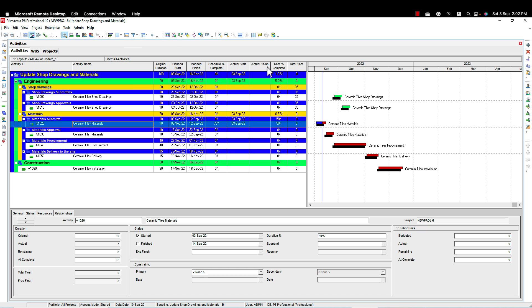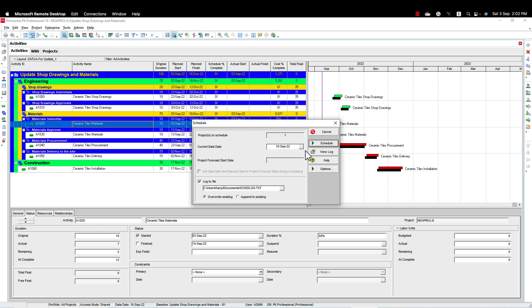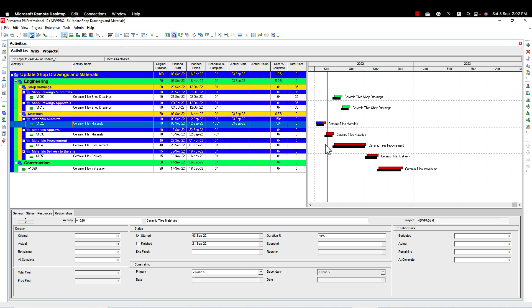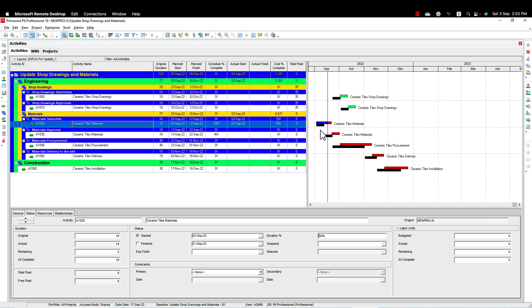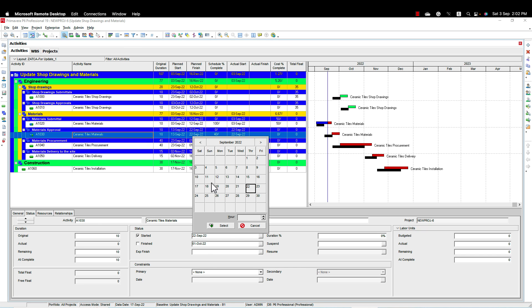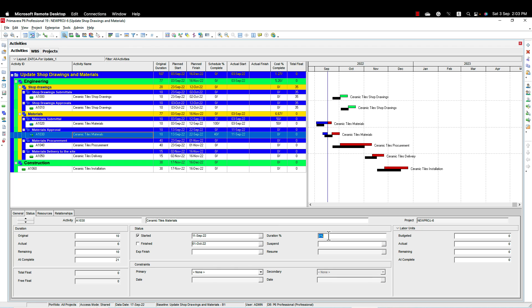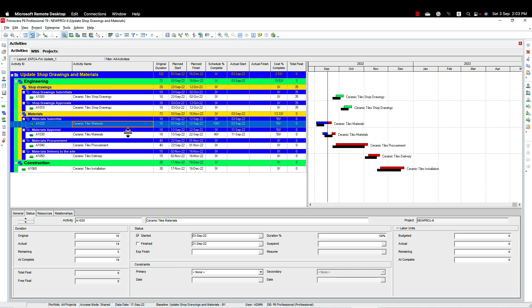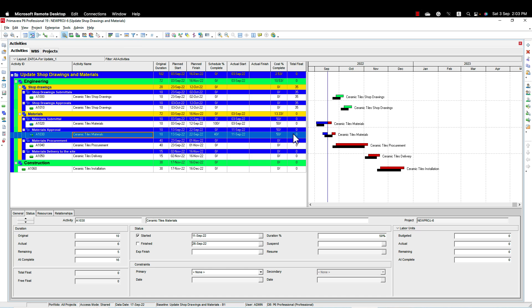For the second week update, which is 17th September — let's say I received 'revise and resubmit' by 11th September. In that case I go to the approval activity and set the start date as 11th September and put 50 percent for the approval. Now I don't have either the submittal or the approval completed at 100 percent because I haven't yet received a Code B or Code A for the material.